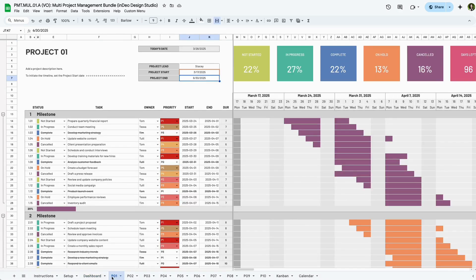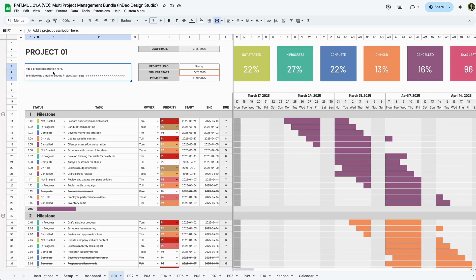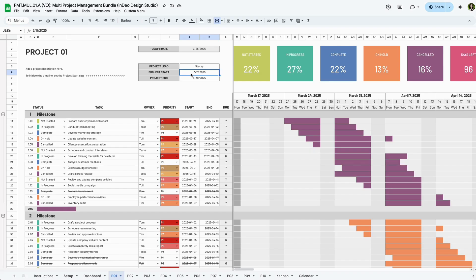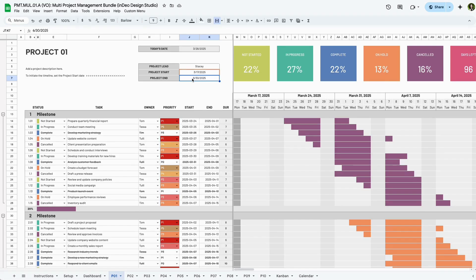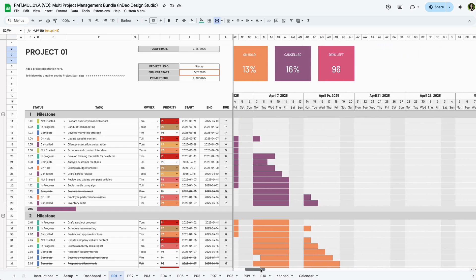Now let's dive into the project tabs. This project view tab gives you a deep dive into a single project, in this case, project 01. The title is auto-populated from the settings tab. Use this open space to write a quick summary, goal, or mission of the project. This keeps your focus front and center. Add the name of your project lead to establish clear ownership and accountability. Then choose a start date for your timeline. This adjusts the calendar view and ensures all tasks align with your project schedule. Choose an end date to calculate how much time you have left before the project is due. These status boxes give you a high-level overview of your project status as well as how many days you have left in the project.